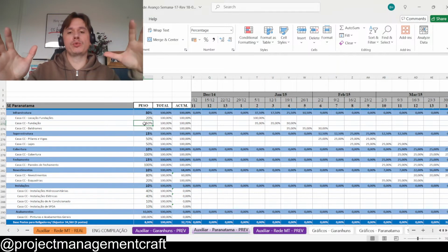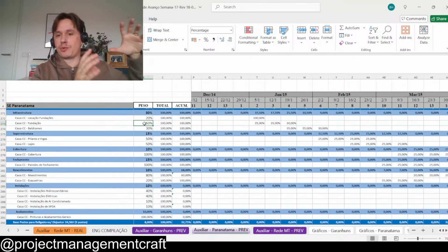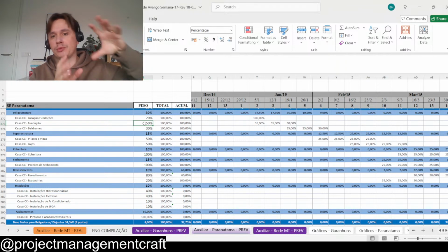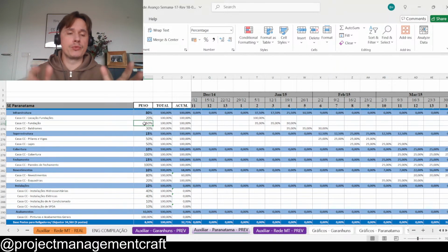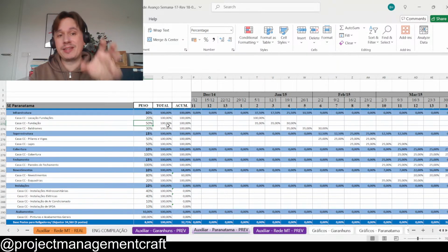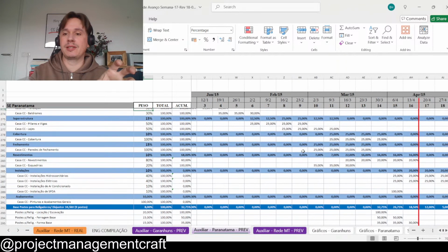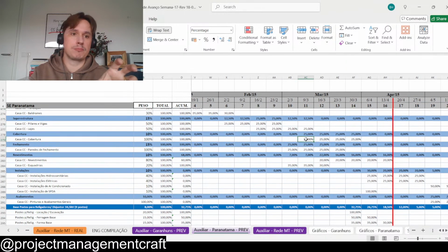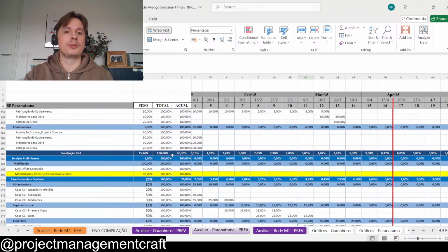So what you're going to do is take your WBS, that's a work breakdown structure with all your deliverables. You put it in MS Project, break it down into tasks, and create your timeline, beautiful. Then you copy those dates, copy the same structure, and put it in Excel with the dates. Why? Because if you have the formula, Excel can make the split of the tasks based on the formula and the dates that you have there. That's the nice part of what you can do there.